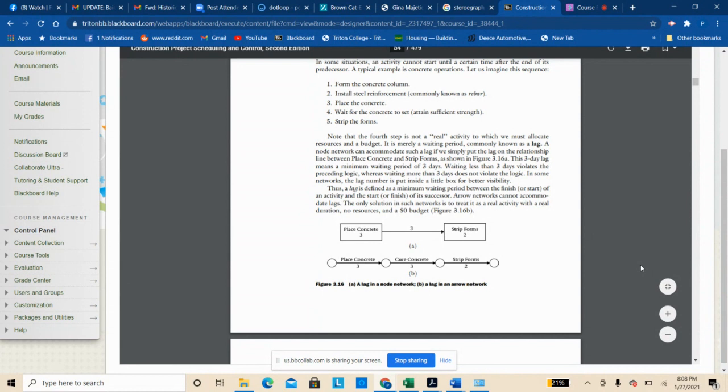You might have resources attributed to it, like man hours or cost, different things like that. That unique path is required because even though the time and the duration might be the same, you might have different resources associated with it where, yeah, but that takes 32 man hours and this takes 60 man hours. And that's why there has to be a different path to be able to separately identify it, uniquely identify it, where it can't just be the task itself and the duration.